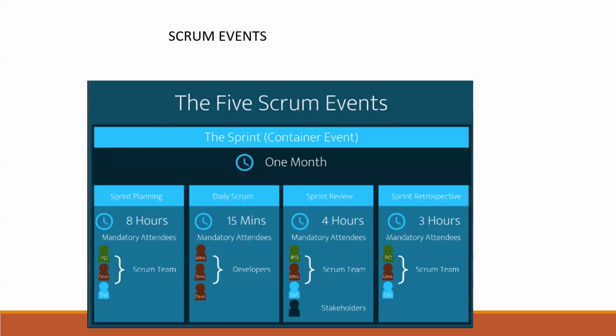See, the thing is, what is the ideal size for the Scrum team? It's max 10 people, not more than that, including Scrum Master and product owner. That means at max 8 are the development team. You can't have more than that. Even if you have, as per the Scrum Guide, you have to divide that into two teams, have two Scrum Masters and do whatever you want.